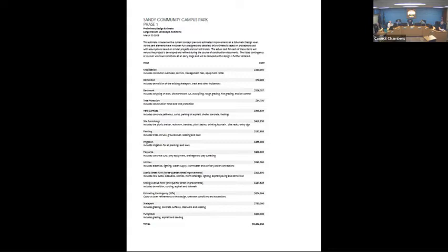Clarification too, because this budget doesn't cover the trail from the existing community campus down to the river. But you're saying that's going in this summer anyway under a separate set of funds or already accounted for? Yeah, that was a portion of fundraising for that park, and then we received a grant, and there'll be a little amount of SDCs that will match the construction of that trail. The trail will go in this summer, so that'll be done first, and then the construction of phase 1 of the community campus will go in shortly after that.